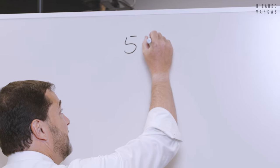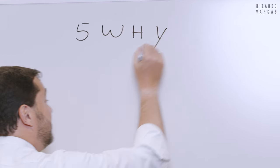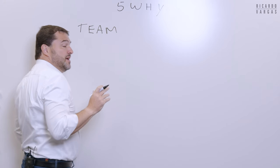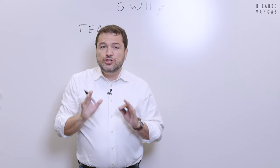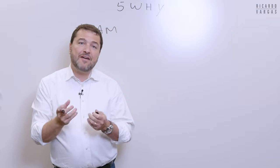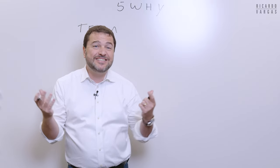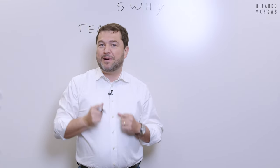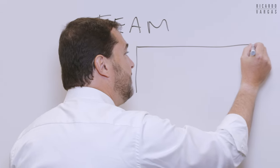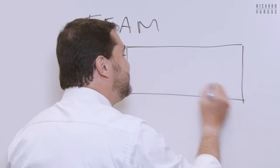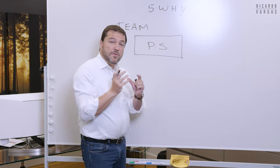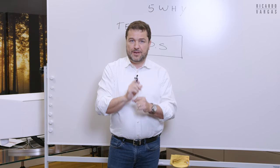The first step of the 5 Whys is to prepare a team. You should never do the 5 Whys by yourself. It's great to have inputs and understanding from other people about your problem. Then, with the team, you will assemble a problem statement. You will describe what is your problem.